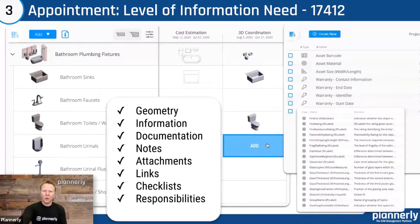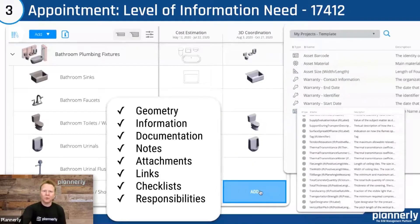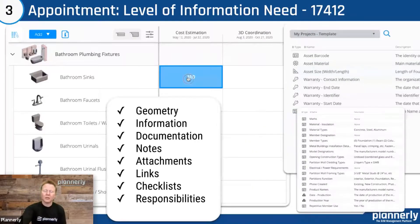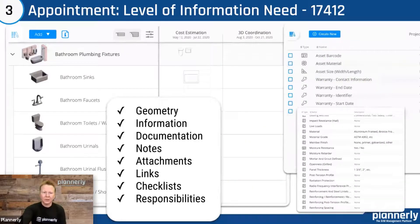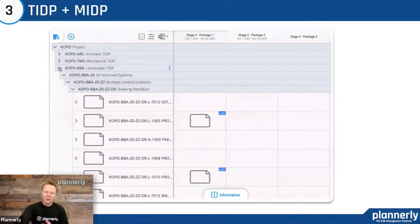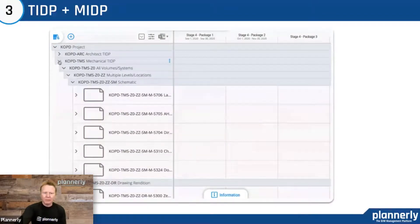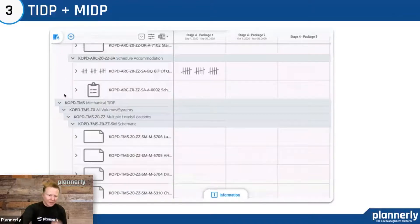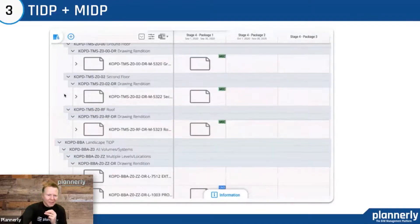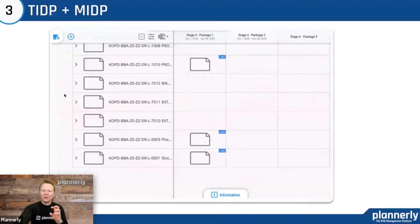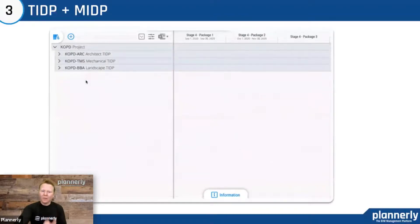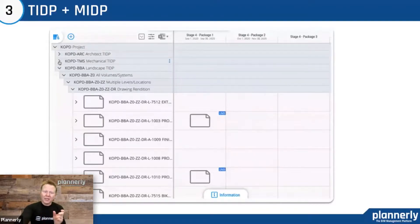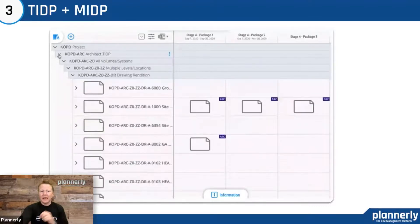The new ISO 17412 is a really powerful way to be much more prescriptive about what you're asking for so you can check it later. For task information delivery plans, we can see examples from the architect, the mechanical engineer, and the landscape team — all summarized to show what they're delivering, when they're delivering it, and how it will be classified and coded in that delivery.